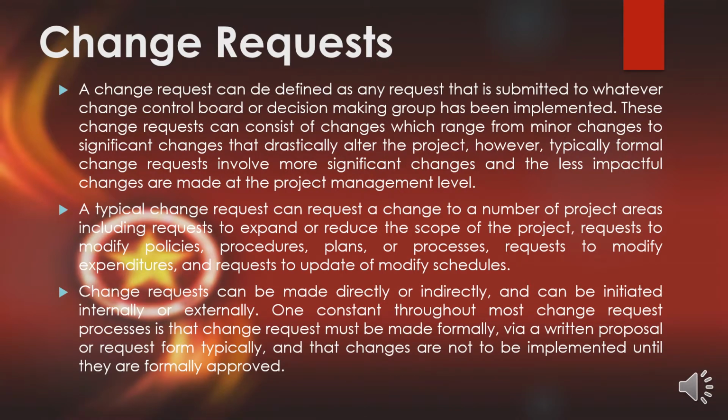Change requests can be made directly or indirectly and can be initiated internally or externally. One constant throughout most change request processes is that change requests must be made formally, typically via a written proposal or request form, and that changes are not to be implemented until they are formally approved.